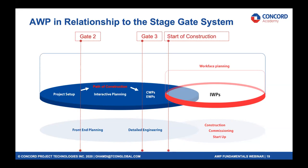When we get through gate three — generally where projects get authorized, called full funds authorization or full investment decision — that's basically when the award happens to the EPC contractor and we start creating engineering work packages and construction work packages, embarking into execution. The process of developing installation work packages and giving them to the crew is called work face planning.